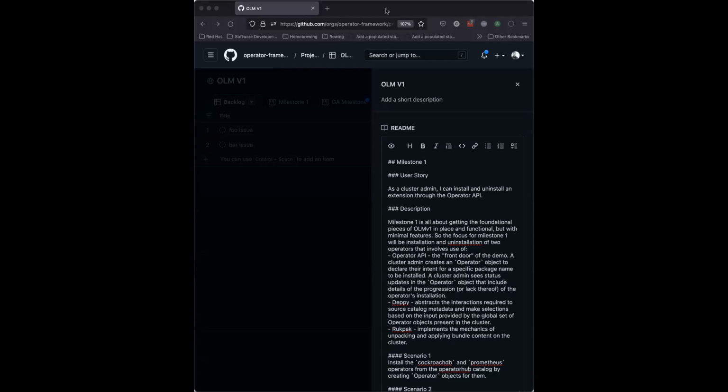Yeah, I definitely think that with whichever medium we take to collect that feedback, the milestone needs to be discussed and defined in one of these types of meetings, right? So creating some pool of suggested focuses for the upcoming milestone makes sense to me. And then deciding on the focus of the milestone from that proposed pool in an upstream meeting, where everyone has an opportunity to weigh in, makes sense. Kind of like what we're doing here.